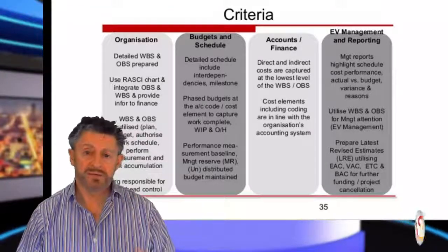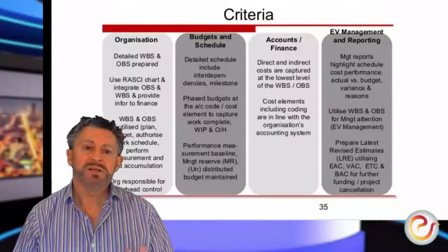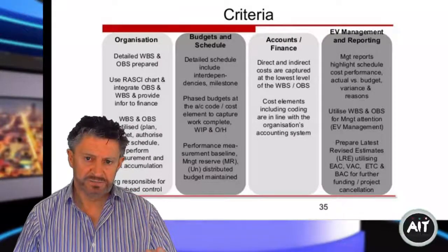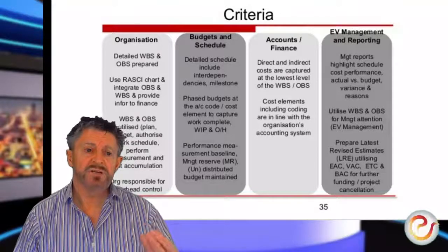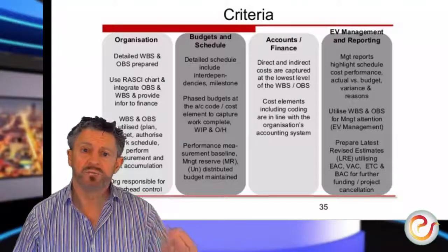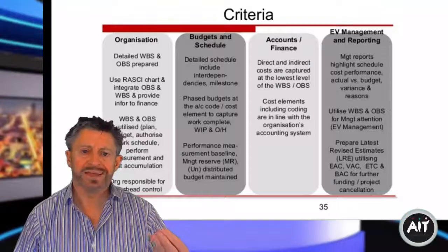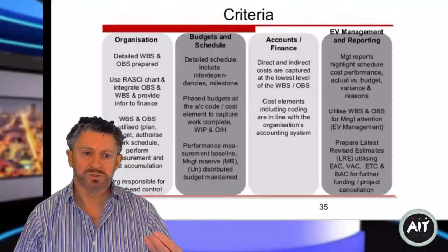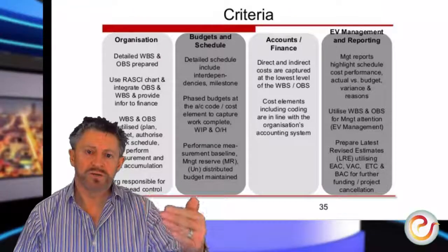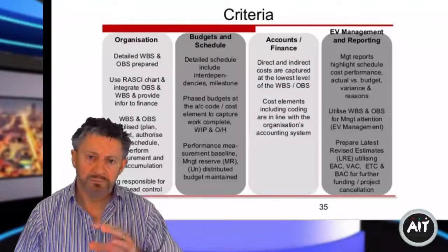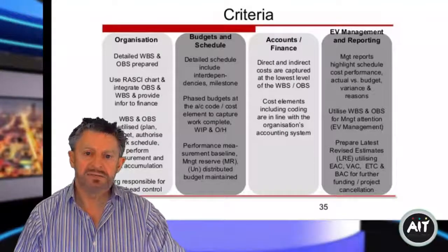And how we defined those was that if we needed management intervention, if we needed senior managers or the project sponsors, we need your help, we need more budget, we need more people, we need more equipment that we can't get ourselves in the project. Can you help us? They were the criteria where we needed outside support. Minor issues we handled internally.